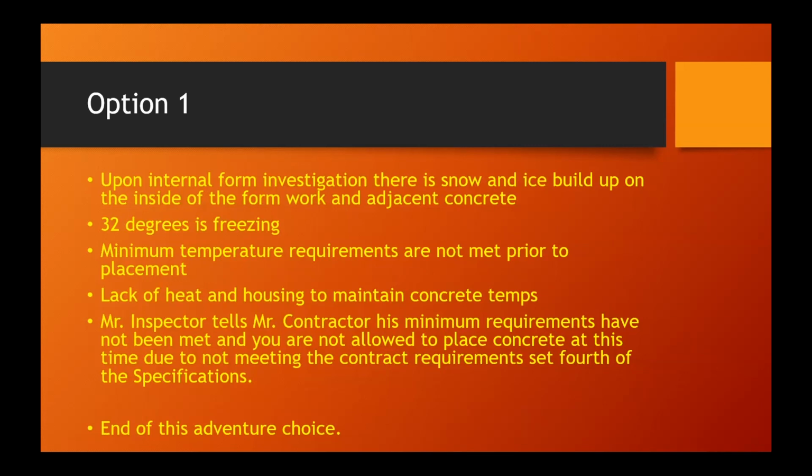But our minimum temperature requirements are not met prior to placement. The lack of heat and housing to maintain concrete temps are not in place. So none of the specifications have been met. So Mr. Inspector tells Mr. Contractor his minimum requirements have not been met and you are not allowed to place concrete at this time due to not meeting the requirements per the specification.